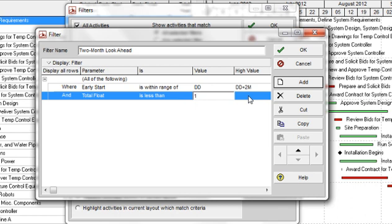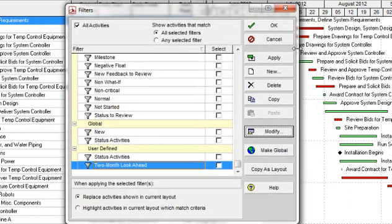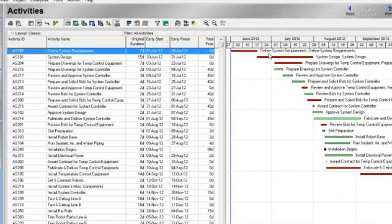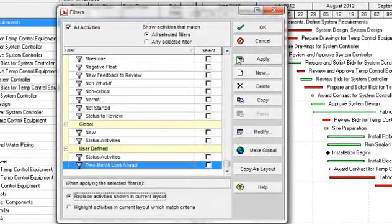And the value we're going to put in is one. We have now modified the filter to meet both the parameter of activities starting within two months and that have a float equal to zero or less. Click OK, then click Apply and OK. You will see the same results as the previous example.